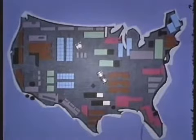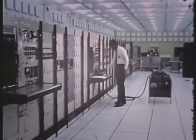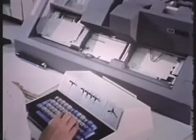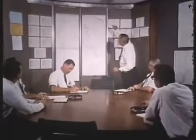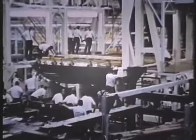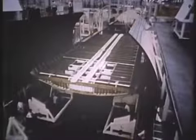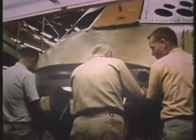As the massive project moves forward in the subcontractors' plants, a special computer system at Lockheed digests hourly inputs from all across the nation. Any test that fails, any scheduled drift, any design shift, any shortage. Project managers are advised of trouble immediately and can take action before it grows. And production hits a peak of activity. Finished components flow in an increasing stream from the plants of suppliers to Lockheed, where the giant aircraft gradually take shape.